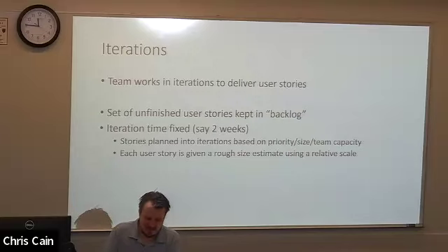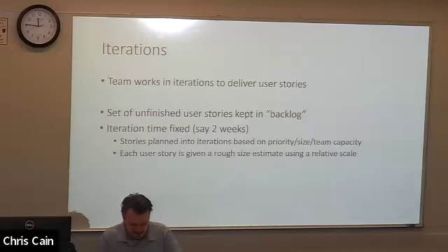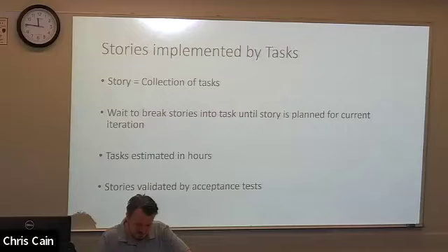Unfinished user stories are kept in a backlog. If you aren't able to get to something, that is still something you need to think about for the next sprint, so work it into the next sprint's tasks in some capacity. Tony might come to you and say, I don't like how this is done, you should do it this way instead. That would go into the backlog of something that's going to happen in the next sprint.